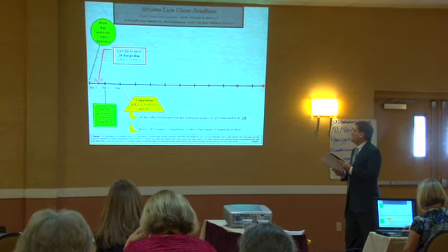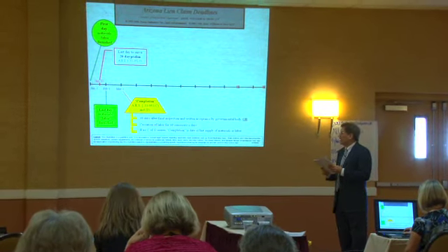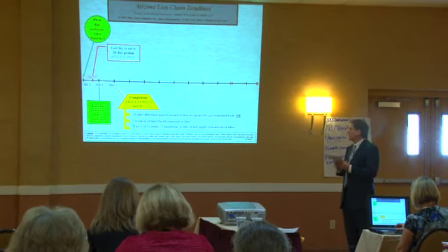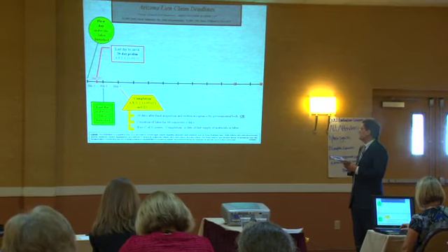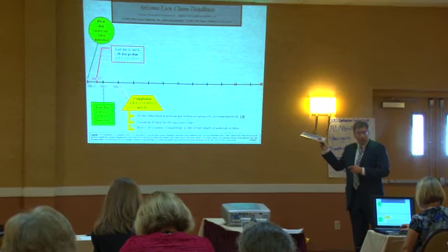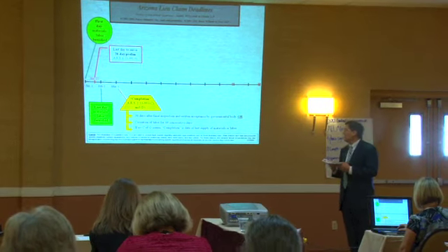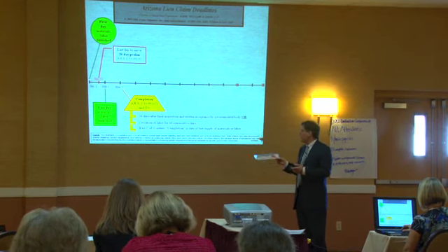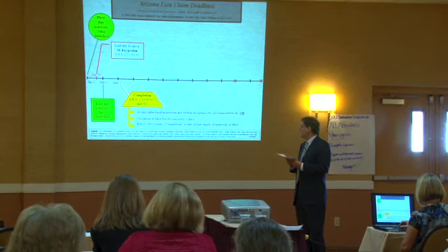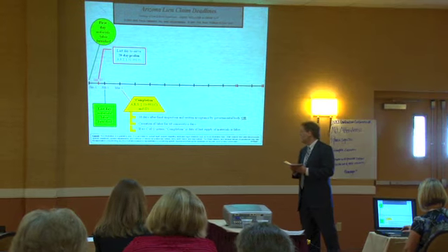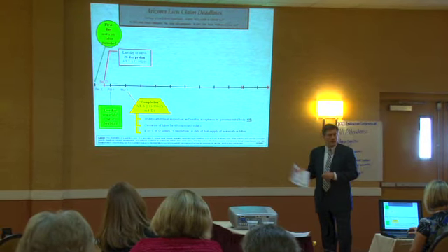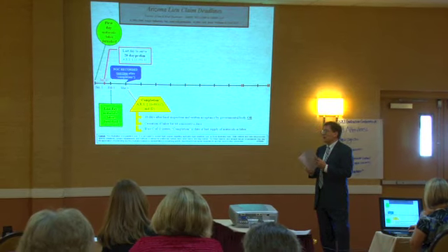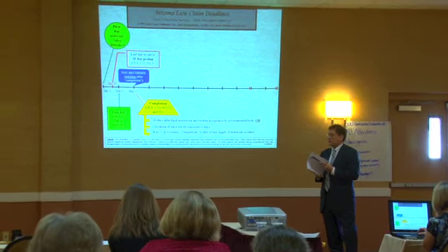The next thing you got to think about is when was the project completed? Project completion is a term of art. It's defined by statute in 3 different ways, as we discussed. 30 days after final inspection and written acceptance by a governmental body, certificate of occupancy, that's what that is. Cessation of labor for 60 days, the project may not be complete, but people have stopped working on it. And if no C of O issues, completion is the last date of supply of materials or labor. That's why that February 1 date matters. It doesn't always matter, but in this instance it could, because that's the last requirement or definition of completion.